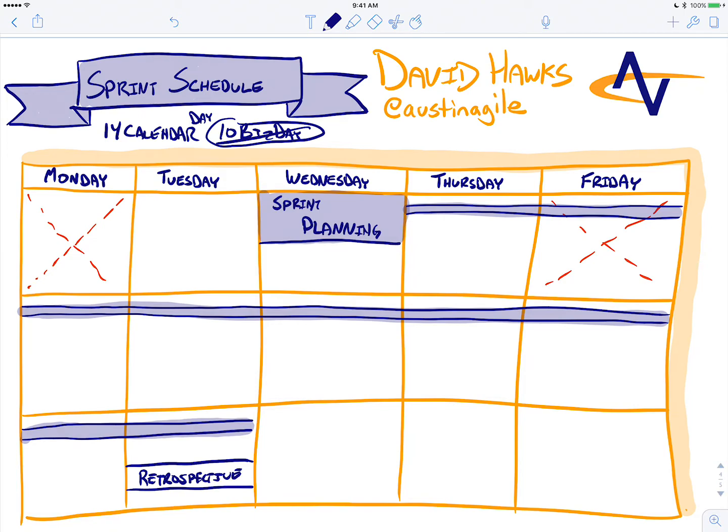If you do the retro first, then you can share in your sprint review with your stakeholders what you learned and what you're going to do about it. But the downside is if the review doesn't go well, you've already had your retrospective and you might not be able to take that feedback into your retrospective. So the advantage of doing the review first is that you can retro on how the review went. So pros and cons, you can do either way.